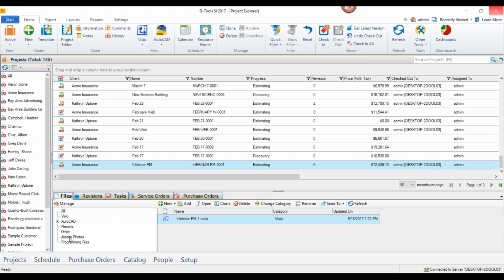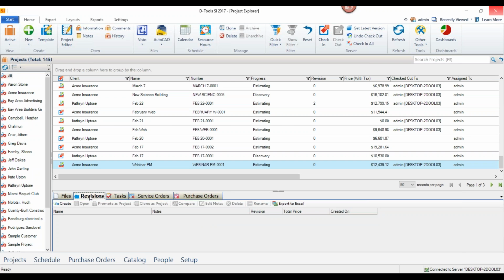So everything project related is in one spot. We can also track revisions. As you go and make these revisions to projects, as things get updated or clients make requests, we can keep a history of all those different changes, and we can also easily issue change orders as well. Always a huge pain for most people, and this really streamlines that by just simply clicking it, changing it, and then it'll document what's been added, what's been removed, so someone can sign off on it.